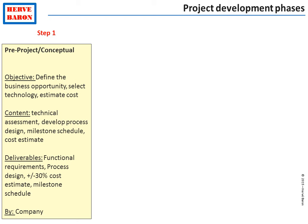Since step two, which will be further refining the technical feasibility of the project, will involve a significant amount of expense, at the end of step one there is a gate where the decision is taken based on the assessed attractiveness of the project, whether to proceed to step two or not.